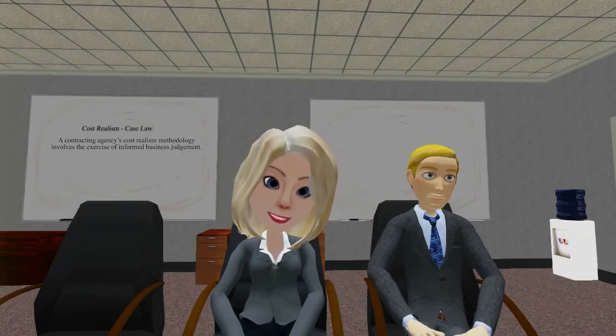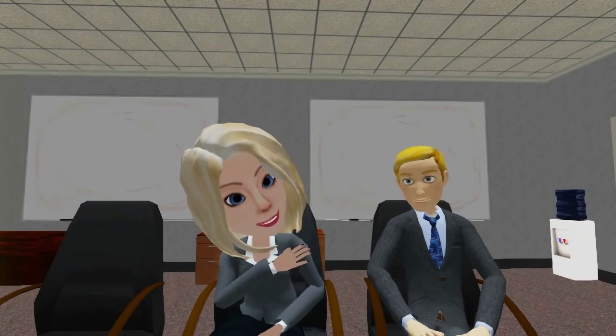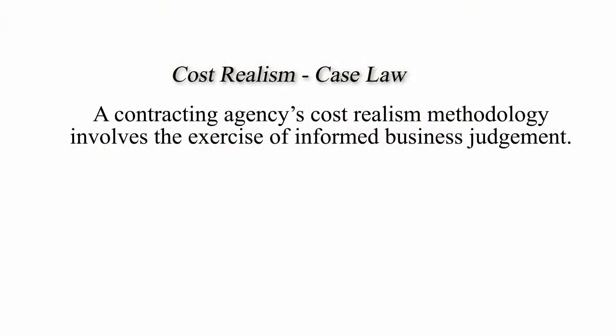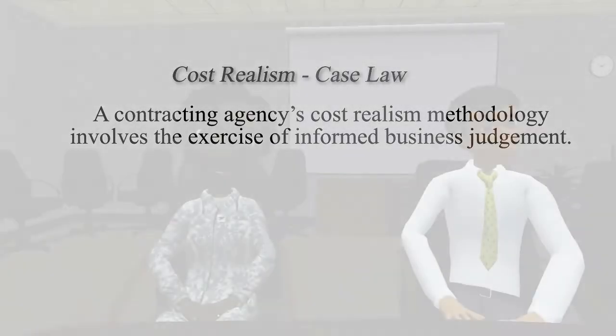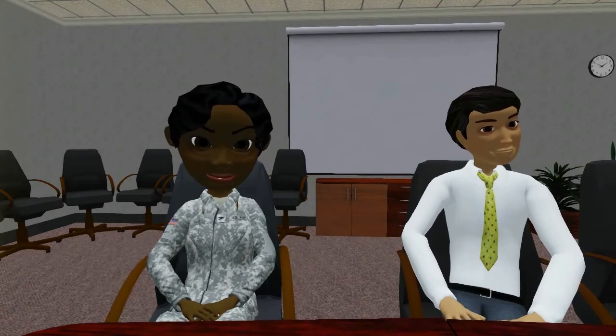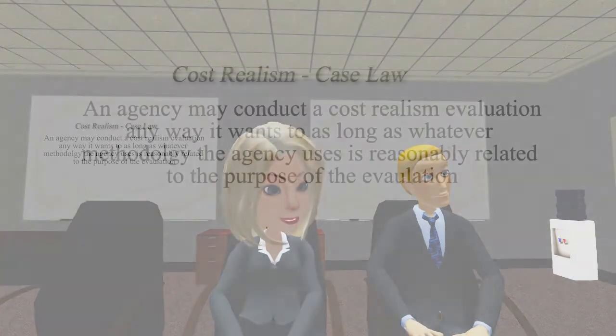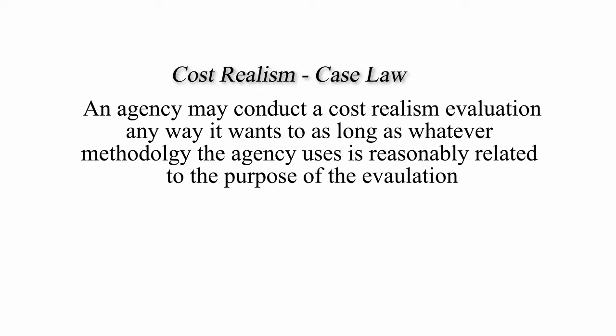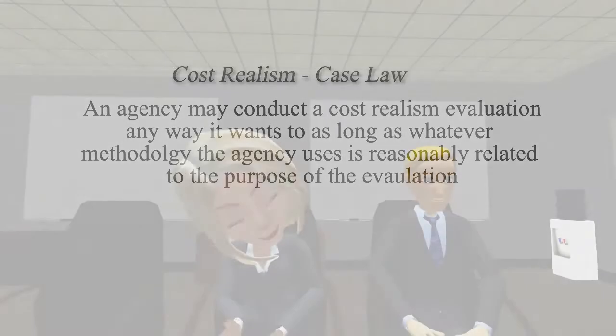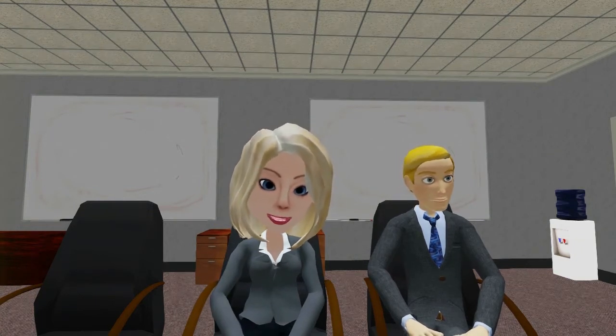That's an excellent question, but the answer isn't simple. This may be the most difficult aspect of the cost realism evaluation concept. Because there are no statutes or regulations that either require or prohibit any specific methodology for conducting the cost realism evaluation. Case law from both the General Accounting Office and the courts has consistently held that a contracting agency's cost realism methodology involves the exercise of informed business judgment. Even if a protester challenges the cost realism evaluation, it will not be successful unless the offeror can show that the government's determination lacks a reasonable basis. Therefore, an agency may conduct a cost realism evaluation any way it wants to, as long as whatever methodology the agency uses is reasonably related to the purpose of the evaluation — which is to make an informed judgment of what costs the government would most likely incur by awarding a contract to that particular offeror.